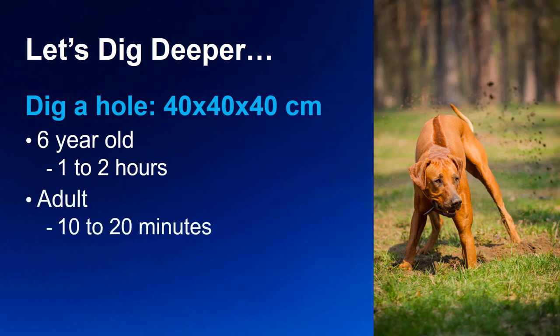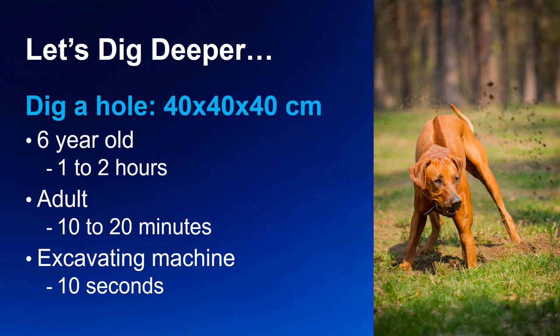If employing a six-year-old were not against the law, we would probably get a result in the region of one to two hours for that child to dig the hole — not ideal for 50 or 60 holes. A better choice would be an adult, who could complete each hole in about 10 to 20 minutes. But for hundreds of holes, a modern excavating machine completing the task in only about 10 seconds would likely be the best choice. Also, don't forget the skills of your resources — a terrier would be better for digging than a hunting dog.